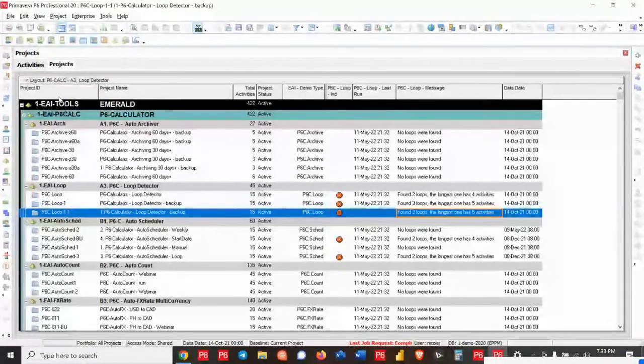Okay. So again, you might think, well, I don't need that, I just do it inside P6, and that may be fine. But what we found is this can be quite handy, especially if you're using auto scheduling. We have lots of clients who do use auto scheduling, especially after their integration runs. They auto schedule, which moves the data date, and the percent completes then match the data date. Then their forecasting, in some cases, goes out to automated reports so that they've got up-to-date data.